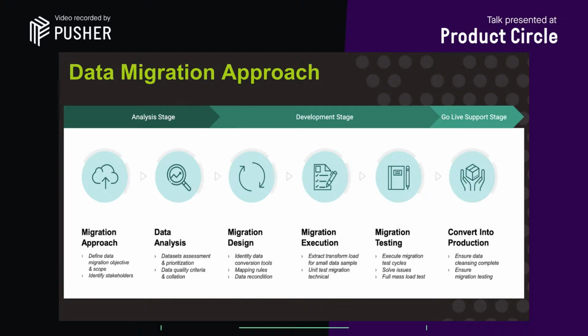Then we performed a detailed data analysis where we assessed data models between source and destinations, along with data quality. This generated a data specification document, the quality of data in source systems, a mapping document which captures data relationships between source and destination, and finally captured all customer journeys with respective data flows.